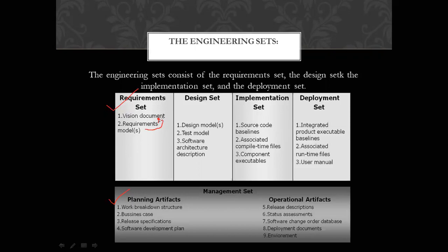Okay. That is another analysis, utilizing which we can check some practices that we have to follow, whether all the artifacts are being implemented properly or not. Analysis of the changes between the current version of requirement artifact and previous version to avoid any rework, delays, to avoid the scrap and defect. Okay. And finally, for the quality of the requirement model and the vision document, review is to be done. Utilizing all these things, we can check whether our requirement set is appropriate or not.